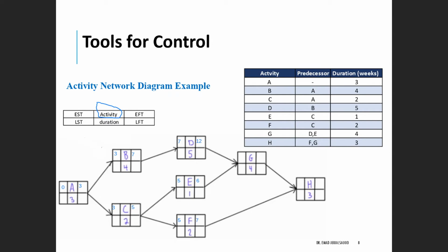So we completed activities E and F in terms of the early finish time. Now we can proceed with activity G. Which one do we select? We have 2 different values coming as early finish times, one from E and one from D. In this case, you select the largest one, the highest one. So in our case, we will select the 12, not the 6. The reason is that if you select the 6, you start G and you have not completed D yet, because D will require longer time.